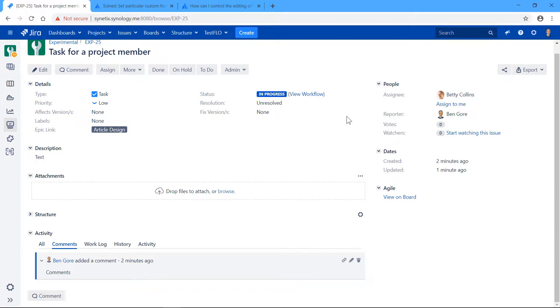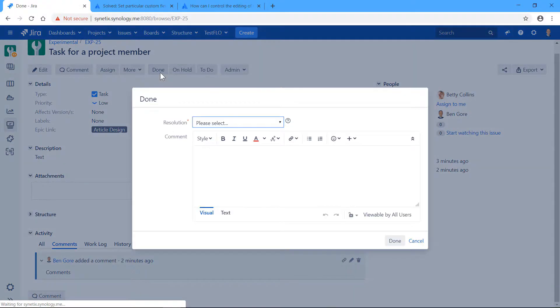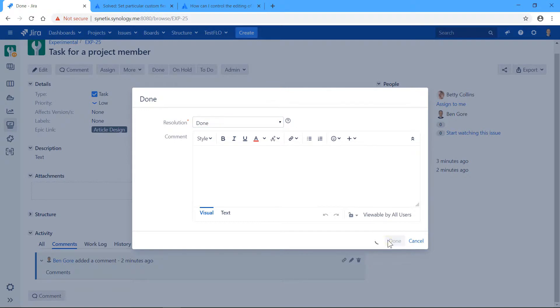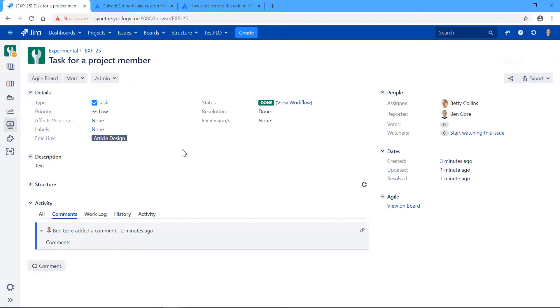And as project manager, I want to make sure that nothing of that is possible after the task has been resolved. So when I mark this task as resolved or done, all the capabilities on this task to be edited disappear.